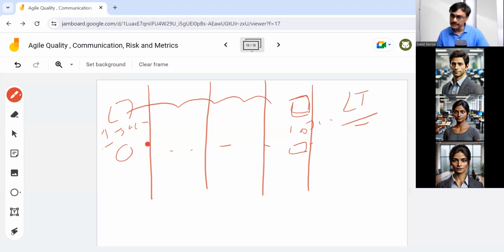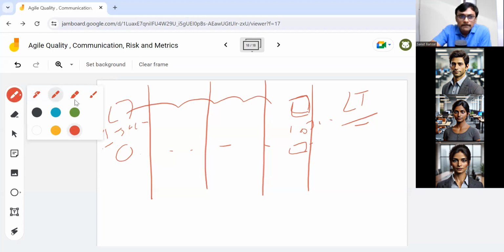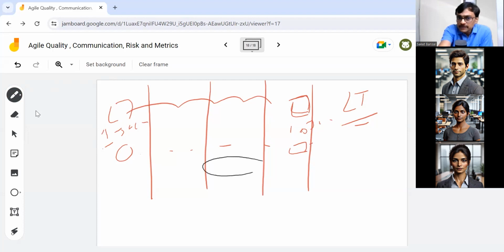We use the word lead time. Now, sometimes you may want to focus on part of the process. You can say, guys, there is a requirement phase, there are so many things. I am doing development. My team is just doing development. The ticket has a backlog and also a development stage. I probably only want to identify how much time we took in our development stage to work on the ticket. So that could be a cycle time.